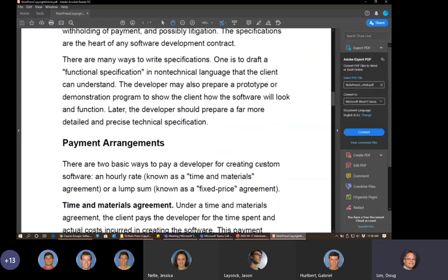Note that the prototype will not be the pure specification, because you can't put that in a legal contract and use it. So you actually have to have your requirement specification with pictures, but certainly a prototype would not be sufficient for the contract.